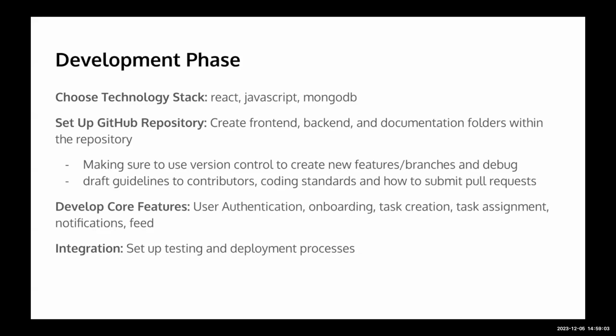And then also it's important to draft guidelines for different contributors, the coding standards, and how to submit pull requests. And then for the development phase, developing the core features, starting off with authentication, and then onboarding, and then task creation and task management are the core features to get set up. And then integration will be setting up testing and deployment processes.